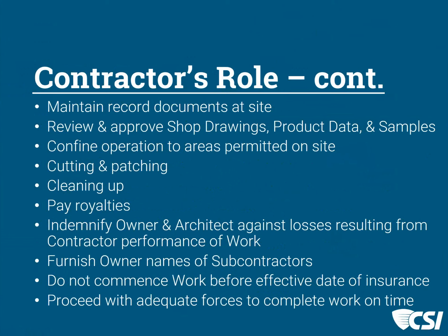But remember, we're on the fence and we're supposed to be impartial. Speaking up for the contractor, I think, is really important, especially early. So in my experience, if for example you're able to sit down, and this is getting to the answer to the question to me, before you start the clock, bring the contractor and your client together and say, let's talk about some reasonable times for you to buy this job out. We understand what that means now.